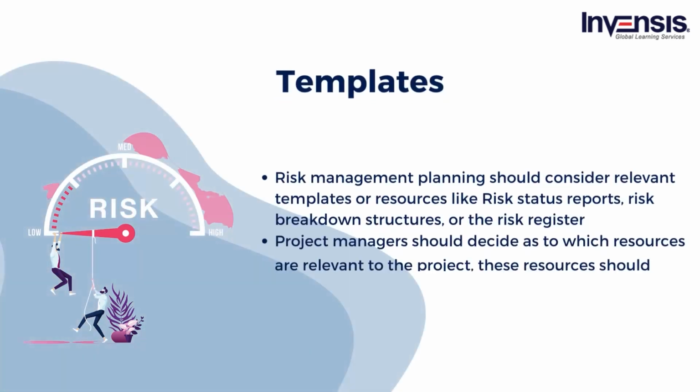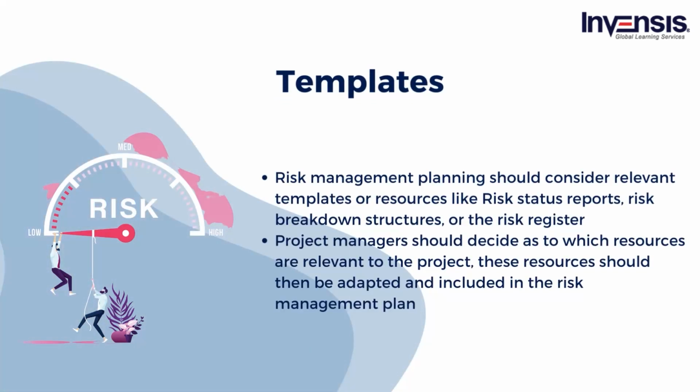For the next tool we have templates, to benefit from existing practices. Risk management planning should consider relevant templates or resources like risk status reports, risk breakdown structures, or the risk register. Project managers should decide which resources are relevant to the project. These resources should then be adapted and included in the risk management plan.